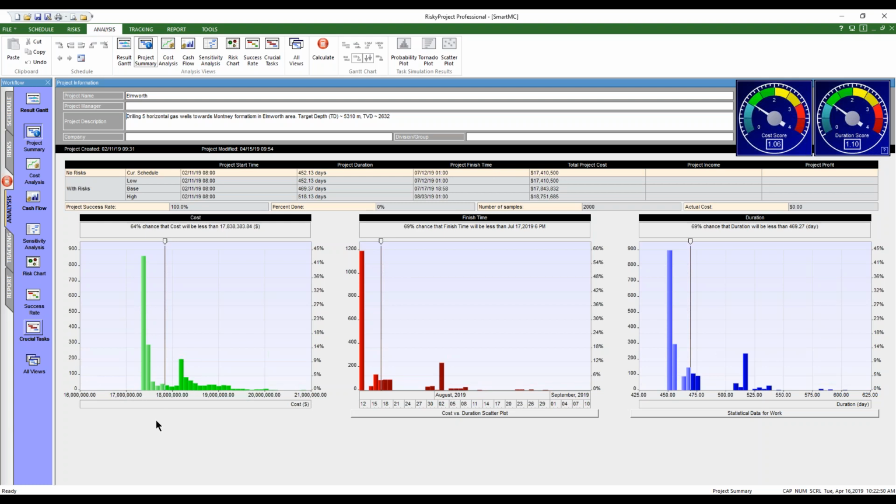And that's really because we don't have any uncertainty. The reality is that in any project we have risk events, major things which cause these major shifts that we can see in the results. It goes from the deterministic, risk happens, another risk happens, and here are some risks happening way off. So it causes what we call a state change in the project.